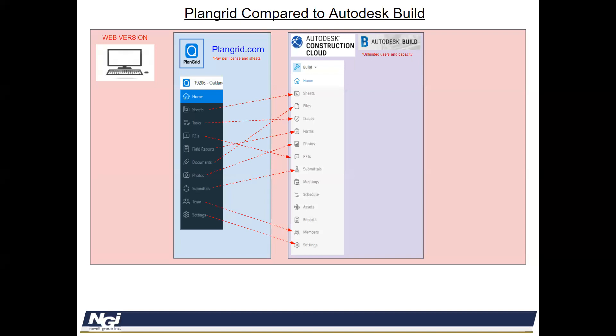So these are all the tools from PlanGrid that migrated over into Autodesk Build. But as you can see, there's additional tools that have been added. They also have some new feature coming out in what one of their rollouts they call is a roadmap called Progress Tracking. You'd be able to highlight walls and be able to mark its percentages complete.